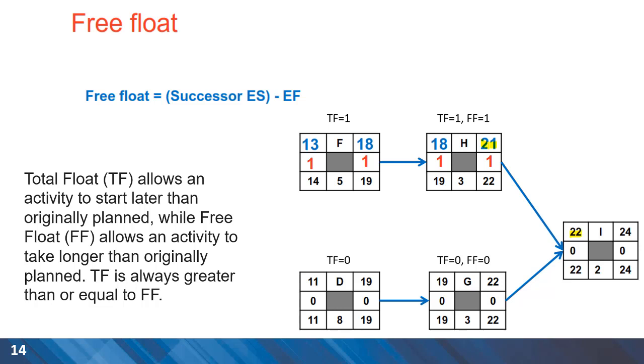Total float shows that we have some flexibility to delay the start time of the activity, but free float allows an activity to take longer than the original plan. It's also very important to notice that total float is always greater than or equal to free float.